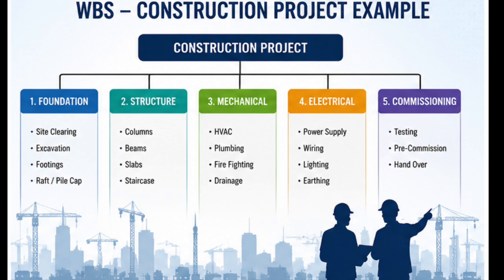Then comes the construction or installation. For the construction WBS, you'll have an initial pre-construction phase where you need to mobilize your site storage, site office, cabins, or material storage yard. If you're having some kind of site fabrication, you need to set up your site fabrication facility, site fabrication yard. Then you also need to prepare the site storage facility. You need to do the fencing and other things. Then you also need to level or prepare that area. That will come under your pre-construction.